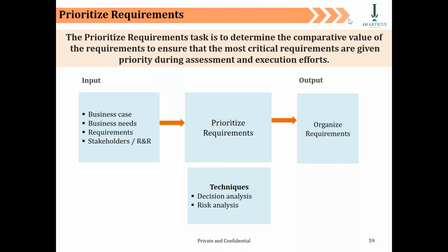So backlog management becomes a fertile territory from where you can pick and choose requirements, because they were already discussed, validated and approved as well. It is just that in the last development cycle of the project, they did not go forward into realization because they were not that important. Business reasons forced you to choose other requirements over these ones, right? So that is what I say is the job of prioritization of requirements. You prioritize to see, from the latest situation, which requirements are more suitable than others, and hence deserve to be part of the solution scope.